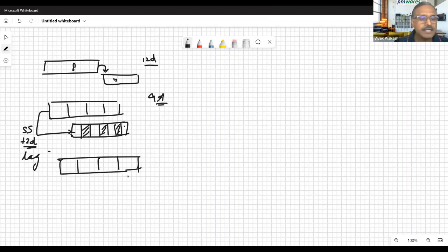And then I will say finish to finish. That means when I say finish to finish, how much lag should I give? Basically 1 day. Why? Because after finishing the last wall, I need only 1 day to do the plaster of the last one.